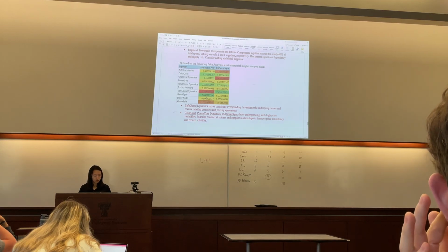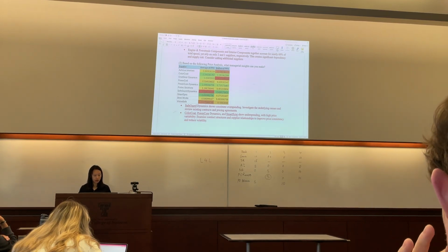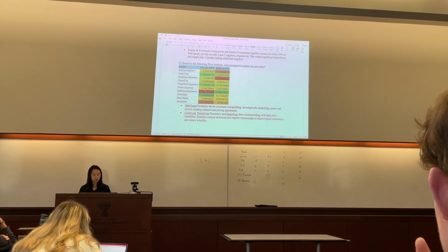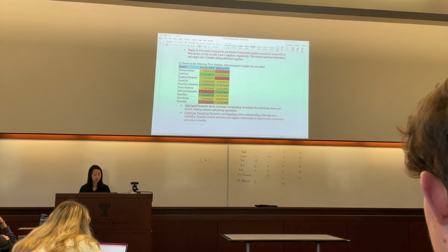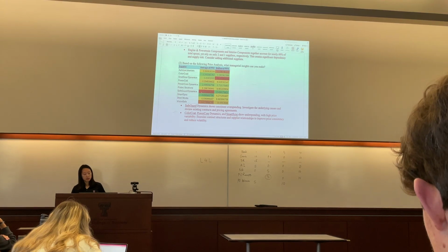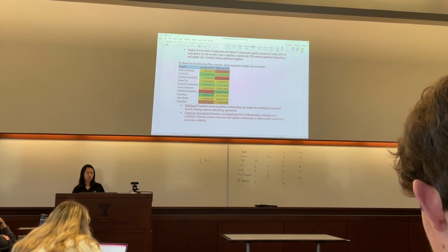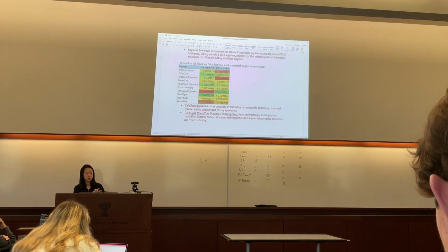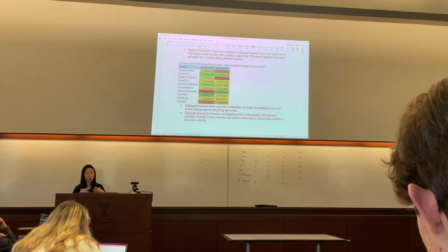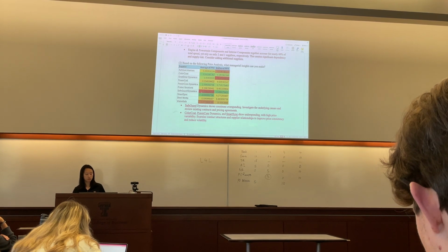Then we can tell from the average that the smallest one, or the most negative one, is the safeguard dynamic. The negative value shows we spent more than we thought. The planned value is less than the actual payment. We are overspending on those suppliers.